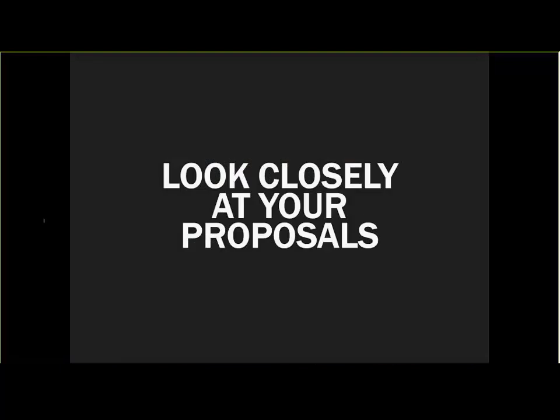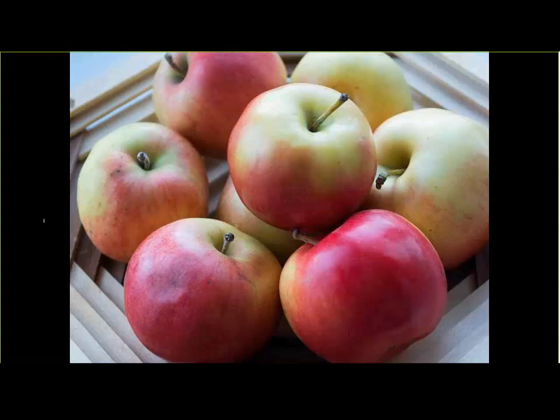So as we near the end of the webinar, prior to taking questions, let's say a few words about proposals also and what to look for, because I know that's a big topic. You need to make sure that you're truly comparing apples to apples. That's this beautiful slide. So first, you might get a proposal that's either fixed price, which is some single amount for the website, or it might be like we present, which is an estimated range of hours and therefore an estimated cost. And there are pros and cons to each option for you, and it's really up to you on which format you prefer.